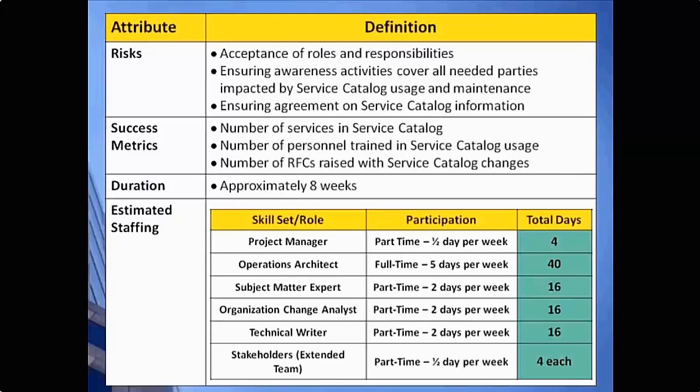Here is yet just one more example of an initial win write-up. We've included it here because this version includes a high-level estimate of the effort needed to execute the initial win projects. For that effort, if you need to pull something like this together, consider going back to those high, medium, lows that you put when we did our scoring effort.